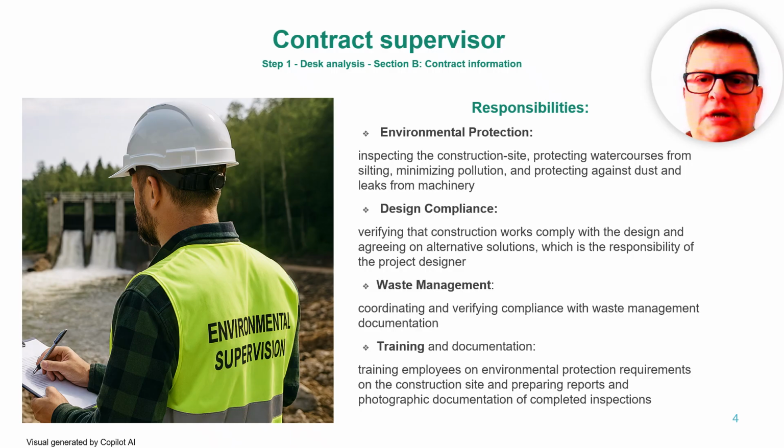Design compliance. Supervisors also need to make sure the construction work matches the design. If something doesn't fit or needs adjusting, they work with the project designer to agree on alternative solutions. The designer has the final say, but the supervisor makes sure everything stays on track.